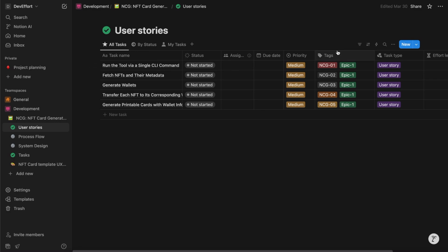I've also created some tags to show that this story is a part of Epic 1, for if I have another Epic. And then I've given each story its own tag so that if I create tasks for each of these stories later on, I can identify how they are connected. Maybe there's a better way of doing this, but by using tags, I find that I can generate nice reporting, but also I can filter. So for the stories, I created 5 in particular, and you can create as many stories as you need to break down that epic. Let's take a look at the first one.